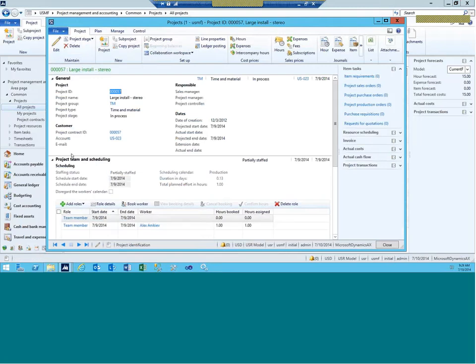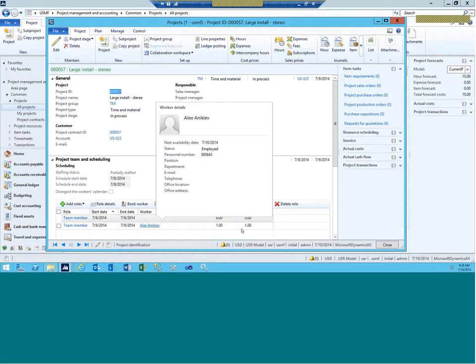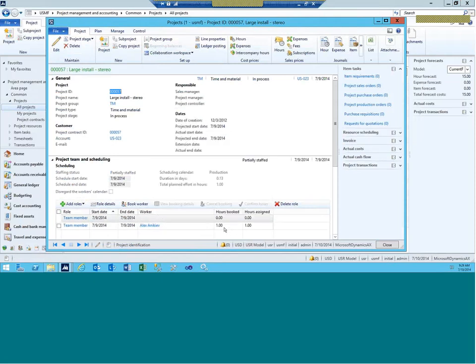For this one, for instance, I have some of the activities scheduled for myself for 1 hour. So WBS is just an estimate, and it's not the subject of scheduling. This is where people often have confusion. When you're done with your WBS, you can use the Project Server, Project client integration to come up with those estimates for WBS, and then you will transfer your WBS into the project hour forecast, and then the project hour forecast becomes the subject of scheduling. That's what we have to understand.